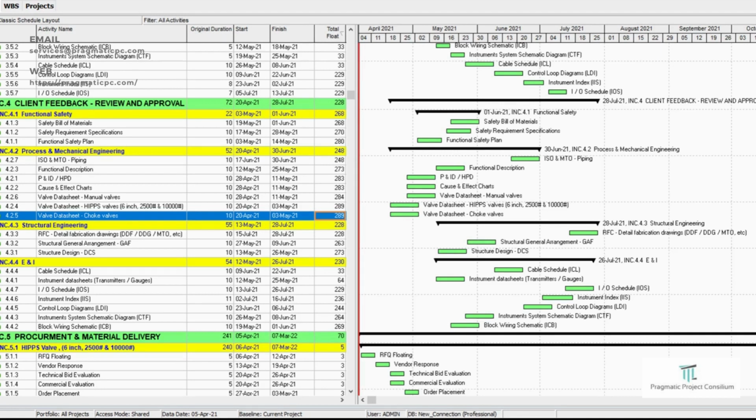So we had to meticulously break down tasks to ensure none exceeded 25 days, with its limitations. While this initial effort felt laborious, it paid off. Our schedule became a powerful tool. Any delay, such as waiting for client directions or document reviews, became clearly visible.